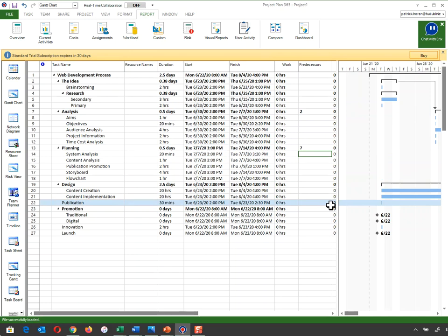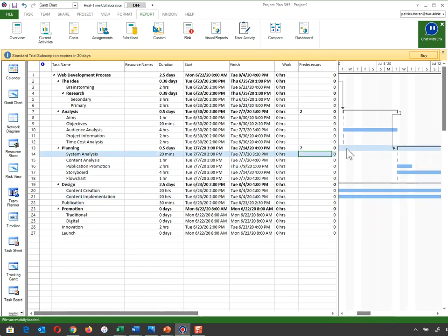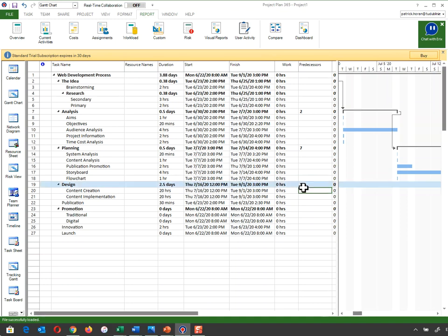And again, you will see if I scroll across here, that jumps out, pushing things out, okay? Design. I cannot actually begin designing until I'm finished planning. So I can't actually start designing my website until I actually have a cohesive set of storyboards and flow charts together and all my planning done. So I'm going to put number 13 there behind it, okay?